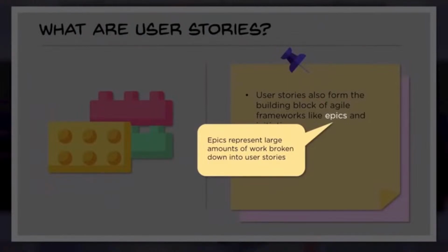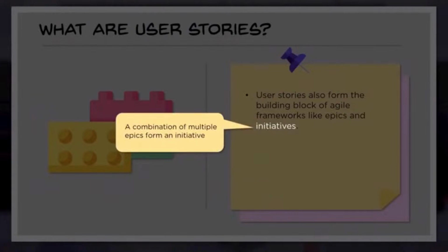So many user stories together form epics, which will provide certain insight into how these user stories are connected with each other. Similarly, an initiative refers to a combination of multiple epics. This is very essential for grouping, so from a management perspective, it will become easy, and also by looking at the objective.